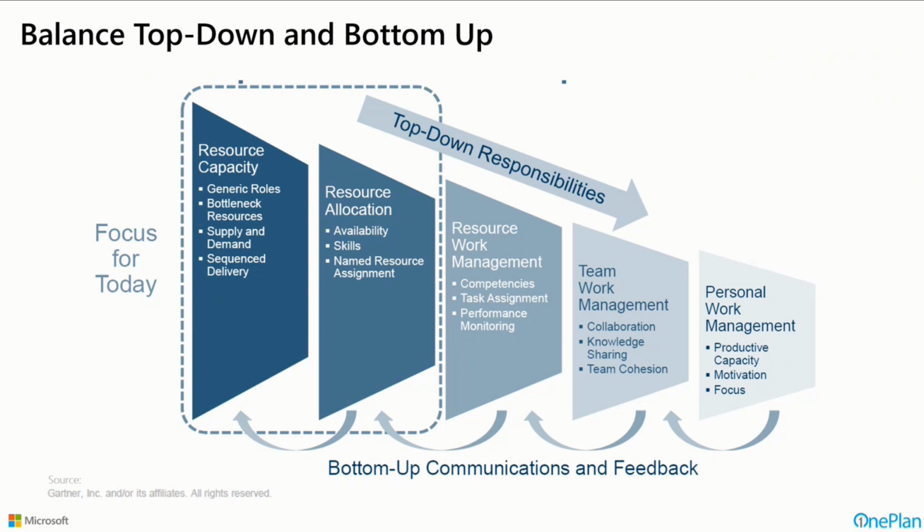They might only do bottoms up, or they might only do top down, but some maybe do top down early on in the life cycle of a project. And then when they do actually have a detailed schedule, roll that up and possibly even compare those two things such that here was our assumption from the top down very early on. This is what the detailed schedule says the actual plan is, and then see how much we vary from those things and reconcile accordingly.